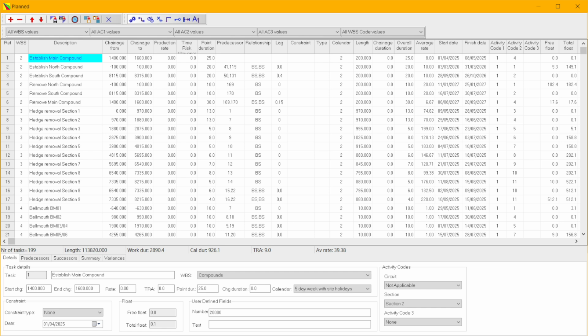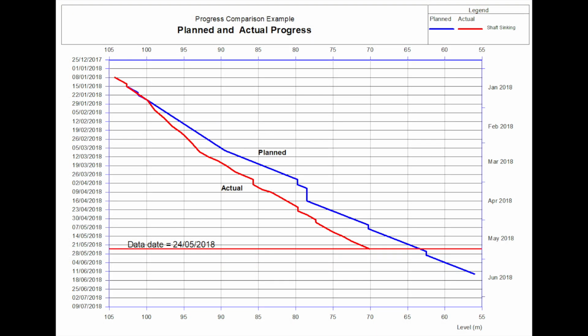Why am I referring to planned activities as opposed to just activities? In TimeChainage we make a distinction between planned and actual activities. They are treated as two separate entities and are entered using different forms. Think of planned activities as those needed to produce the planned schedule, similar to activities in Primavera P6 or MS Project before you add any progress.